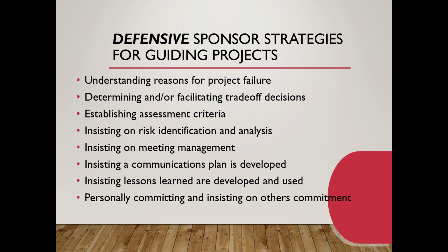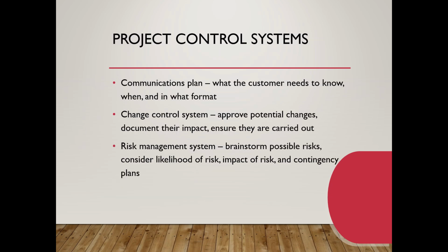Defensive strategies are like understanding reasons for project failure, facilitating trade-off decisions, insisting on risk identification and analysis, insisting lessons learned are developed, and making sure that improvement points are taken care of, etc. Project control systems are like there is a communication plan, change control system, and a risk management plan. These are the basic things that we need to run a project.